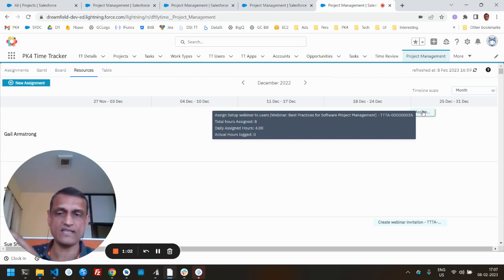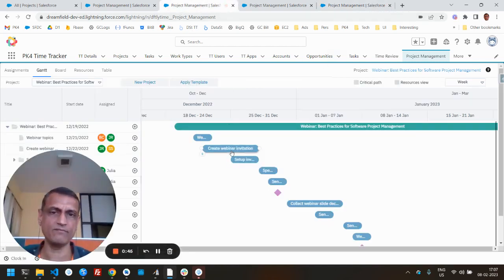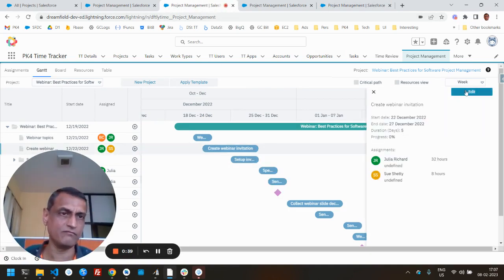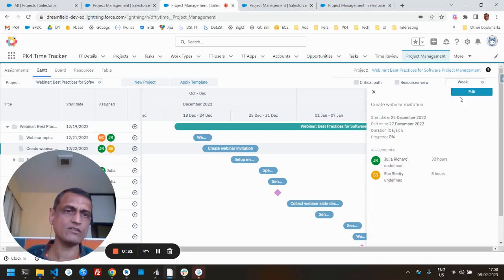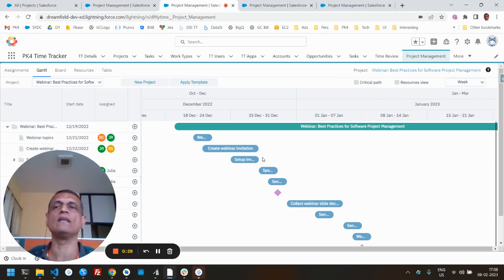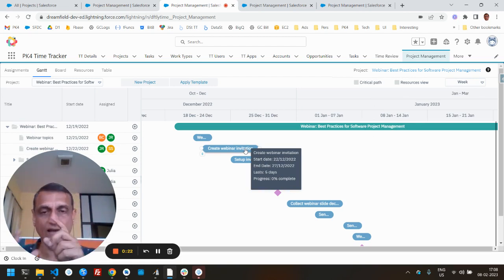So all those things come together on the standard project object that is in TimeTracker. You could create a project, build tasks, assign those tasks, and when you assign tasks to people and they track time, they will see those tasks assigned to them. Then you can go back and take a look at this one, let's say create webinar invitation. It's supposed to last for 5 days, and we have some number of hours assigned to it. We haven't put any here, but let's say we put 20 hours to it. And you can see, of these 20 hours, how many hours have actually been recorded as time against that particular task.